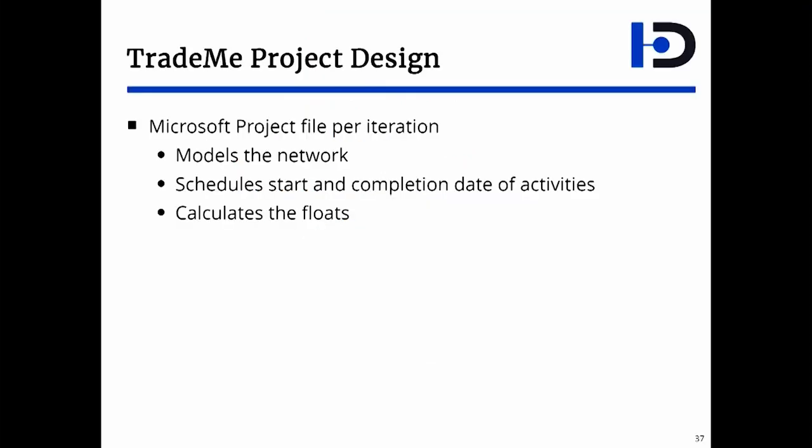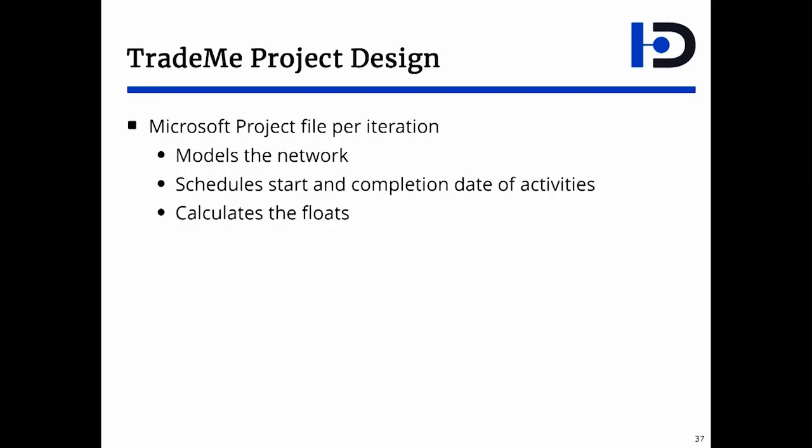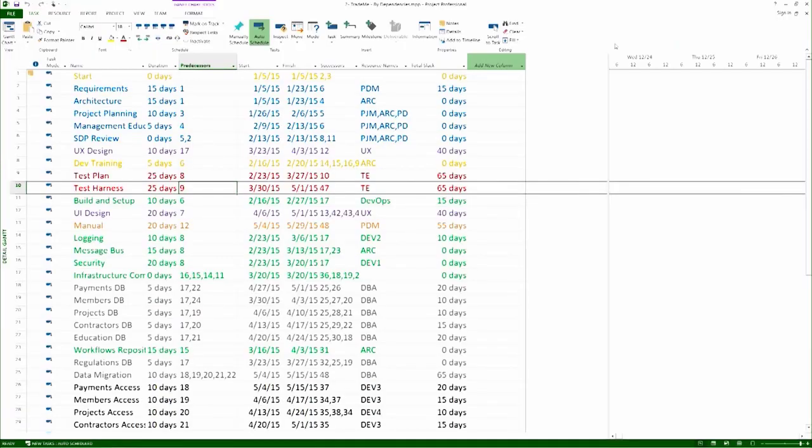The Microsoft Project file for each iteration captures a network. The two useful parts you can get out of it is the start and finish date of each of the activities, and of course the float value. Let's look at that.